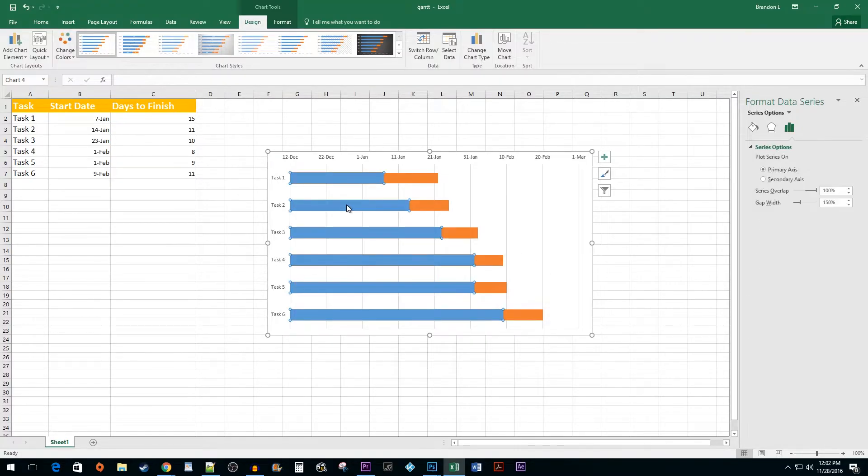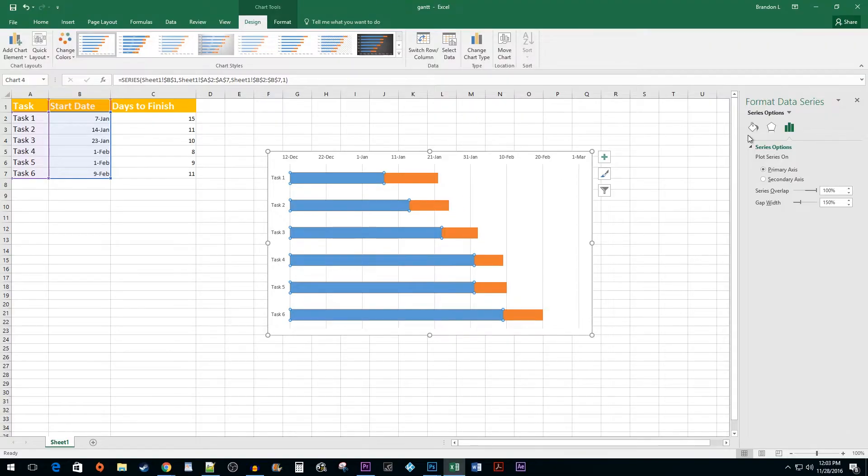Next, double-click on the leftmost bars to format the data series. Select the Fill button and then click on the No Fill option.